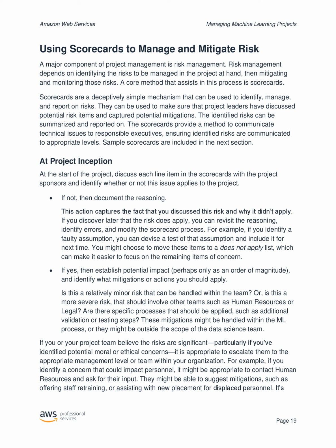team. If you or your project team believe the risks are significant, particularly if you've identified potential moral or ethical concerns, it is appropriate to escalate them to the appropriate management level or team within your organization. For example, if you identify a concern that could impact personnel, it might be appropriate to contact human resources and ask for their input. They might be able to suggest mitigations, such as offering staff retraining, or assisting with new